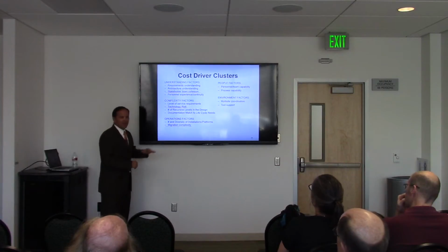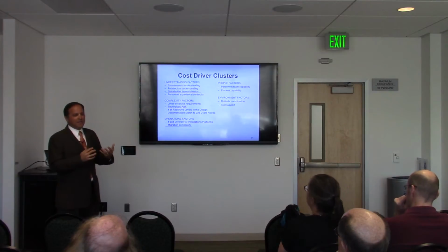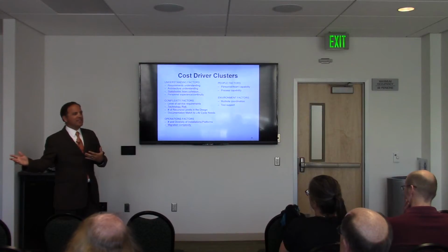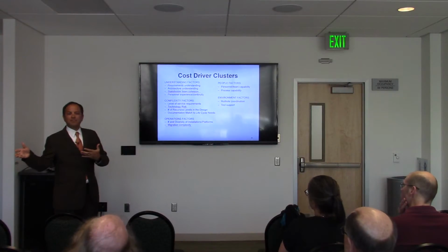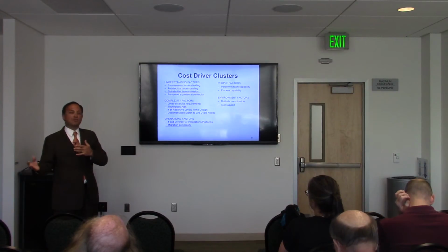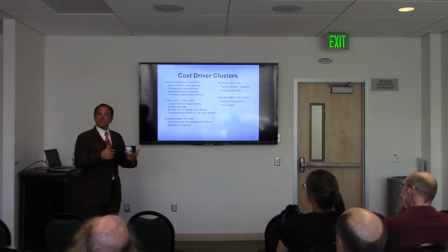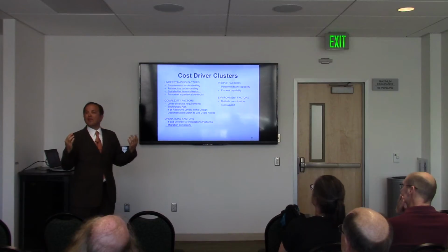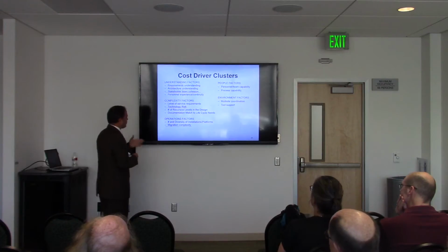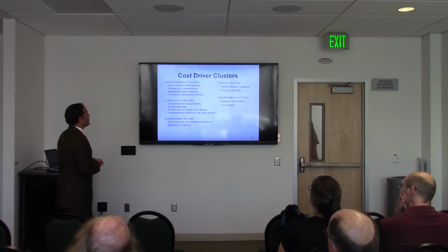I'll just mention one more, migration complexity. This one comes up to bite people very frequently because it basically asks the question, how much of the legacy system do you have to connect to? And if you have to make a special interface, or you have to do a switch over from the old system to the new system and maintain the level of service, that's going to be much more expensive than starting something from scratch, greenfield, right? So that particular driver, often people ignore it, but it drives cost significantly, okay? Because it influences your design, it influences what you can do.